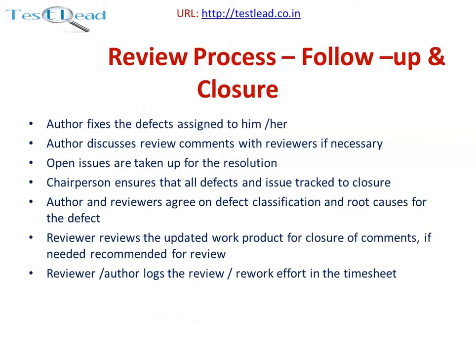For follow-up and closure: the author fixes the defects assigned to them and discusses review comments with reviewers if necessary. Open issues are taken up for resolution. The chairperson ensures all defects and issues are tracked to closure. The author and reviewers agree on defect classification and root cause. The reviewer reviews updated work products for closure of comments if needed. The author logs the review rework effort in the timesheet.